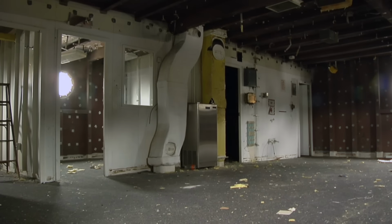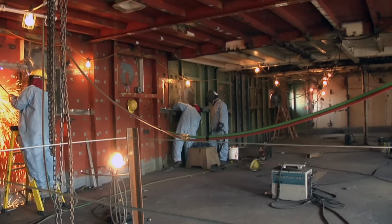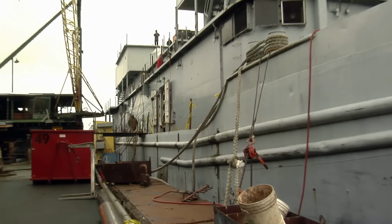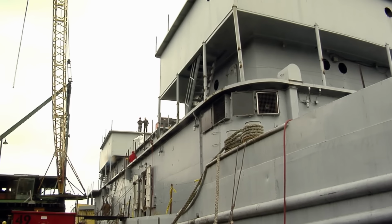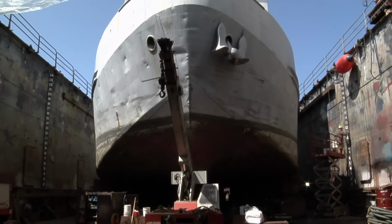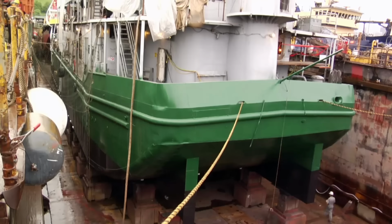Believe it or not, this old girl is going to be turned into a floating home for over 88 people, and in addition will hold a maintenance and machine shop, management and dispatch offices, and helicopter landing zones. But they've only got 5 months to do it. Crews have been organized on a 7-day work week. Massive amounts of materials are ordered and work is underway. While crews work inside, she's gone into dry dock to have her bottom cleaned and a bottom side paint job.